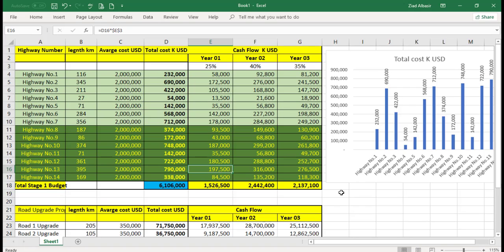Now, assuming this cost here, it gives us some cash flow, which is using Excel per year. When we go to Primavera P6 Professional, we will have it per month. Per week, of course, but I don't want the details per day and per week. We will monitor it by month and quarter in this stage. During construction is a different story. But in the early stage of planning, we will use month and quarter to develop a cash flow plan and to monitor what to do in this project.